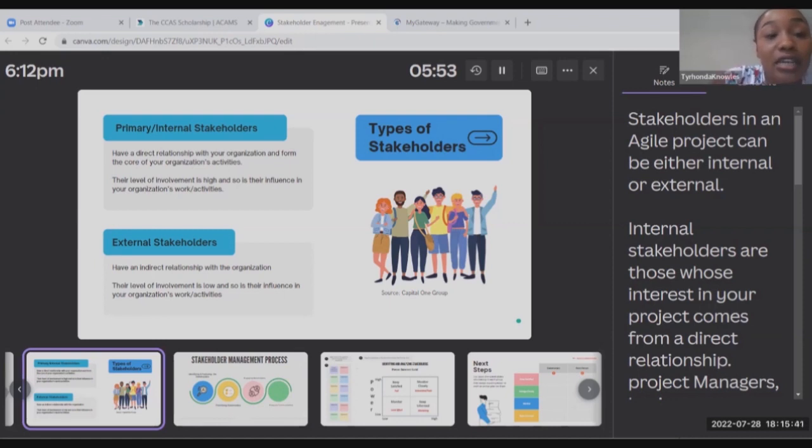So identifying those stakeholders is very important, because using that same example, if we did not involve Immigration and we launched this service with the Department of Labor, when those customers presented that labor certificate to the Department of Immigration, most likely they would have been rejected because they were not informed. And so it's important to identify those persons at the early onset and engage them at different times if possible, or at the same time, depending on the nature of where they're involved. So like I said, those are some of the examples.